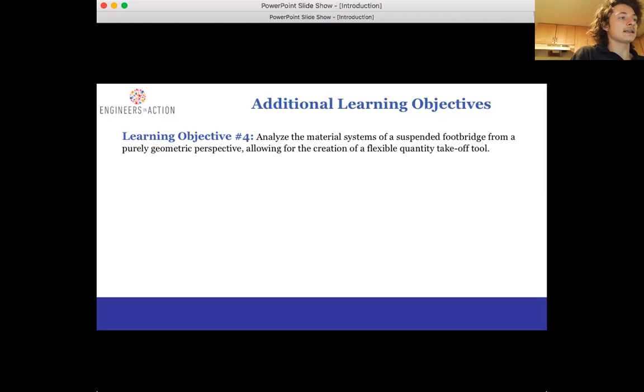What I mean by this is that instead of measuring all of our values in AutoCAD, we can formulate equations for various dimensions that change based on information input regarding your bridge details. This way, you can tie your quantity takeoff to your design calculations and collaborate with the design manager of your team to optimize material usage. As you follow these lectures, try and keep a spreadsheet open to do the calculations. Think about what numbers will change if you select different details.